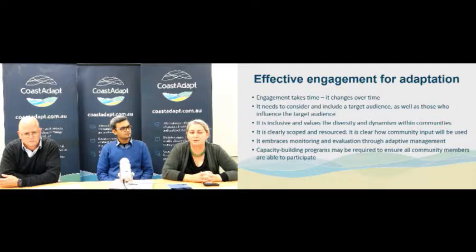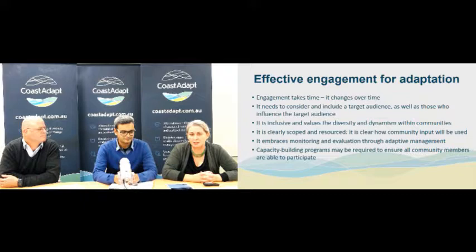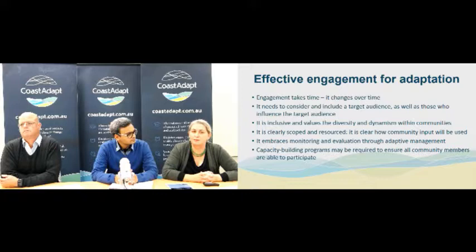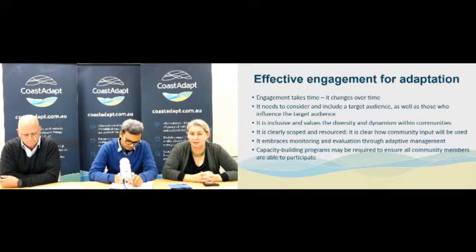Importantly, it needs to consider and include a target audience as well as those that influence the target audience. And how this plays out in coastal areas is that it's very tempting to just work with the people that are directly affected by coastal change. So in some communities, this has added up to the people whose houses are directly affected by coastal erosion being the ones that tend to lead the process and get involved with the process. Whereas other ratepayers who sit further back from the beach or who perhaps are users of the beach rather than directly on the beach, can often get left out of the process.